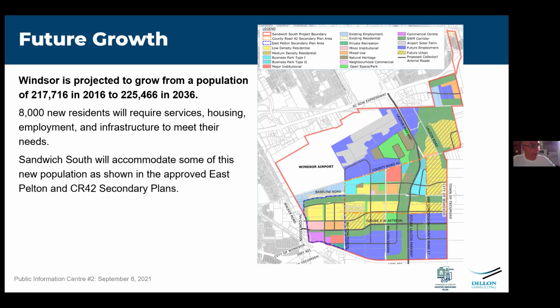The next thing is, in your presentation you talked about the Part 2 Order and the 30-day period. I think it's important that everyone realizes now that based on the Part 2 Order, if anyone still does not seem satisfied with the corrections or adjustments or the addressing of their consultation concerns, after that 30-day period there will be no further opportunity under the new Part 2 Order process to submit a Part 2 Order request to the ministry. It will not be reviewed and will not be allowed unless the matter has to do with Indigenous rights or the Indian Act.